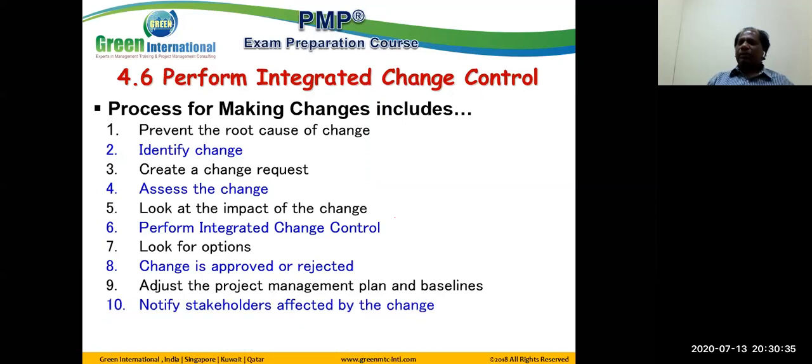Okay. In actual practice, you go through the paperwork, everybody gives input, and finally the client accepts, signs, and issues the engineer instruction, right? Yes, that's the actual practice. But in reality, what is happening is we sit down in workshops. They are not taking the decision alone. We sit down with the consultant, project manager, contractor, and the key members of the team. All are sitting down, analyzing the various options of action. It's all part of these steps.